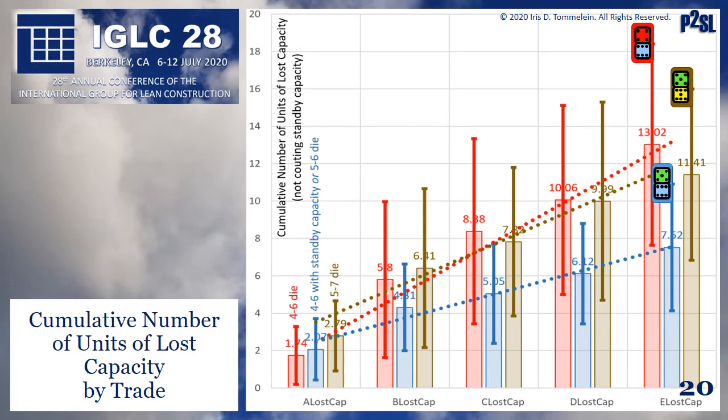In manufacturing, standby capacity may be offered by the supervisor who gets called when the line worker pulls the andon. In construction, we have foremen who can play a key role in creating workflow reliability. However, the pressure to produce may tempt them to play the 5-7 dice game, instead of using their excess standby capacity to observe the work, spot opportunities for improvement in quality and safety, and work with the crew to increase their process capability. When a crew's process capability improves, in fact, the foreman may have even more excess standby capacity. We can argue about it, but that is a good thing.